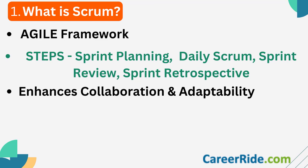Question number one: What is Scrum? Scrum is an Agile framework that provides a structured yet flexible approach to software development. The development process works in small iterations called sprints. The four ordered steps defined in a sprint are sprint planning, daily scrum, sprint review, and sprint retrospective. At the end of each sprint, the team reaches a step closer to a shippable product improvement. As soon as a sprint retrospective concludes, a new sprint begins. The strength of Scrum is it enhances collaboration while responding to the changing requirements of the project — basically a practical way to implement the Agile methodology.